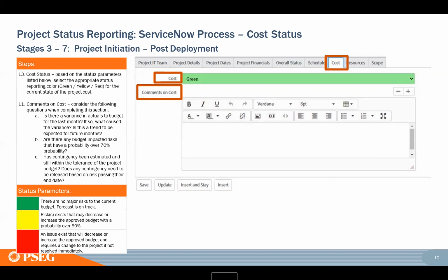And your reason for turning back green isn't that I did a justification. Because if you haven't resolved the risk and it could turn you red again, you want to make sure you're bringing that to light. So when you think about turning red, it's not, oh, I'm just red until next week when my justification gets approved. It's like, no, I'm red until next week because we have resolved the issue and we do not expect this issue to hit us again.